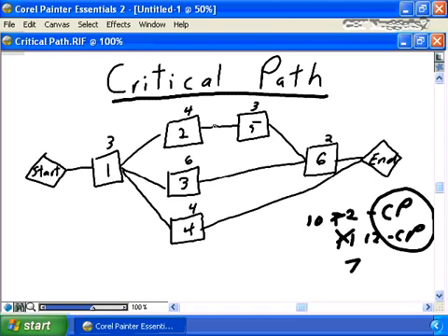So understand what your critical path is, the original 1, 2, 5, 6, and manage it very carefully, ensuring that you're doing everything in your power to ensure each and every one of those tasks complete on schedule or ahead of schedule. Understand what your near critical path tasks are and manage them carefully, because a very small change to any of the tasks that are near the critical path can put them onto the critical path, and then you can't ignore the non-critical path tasks.